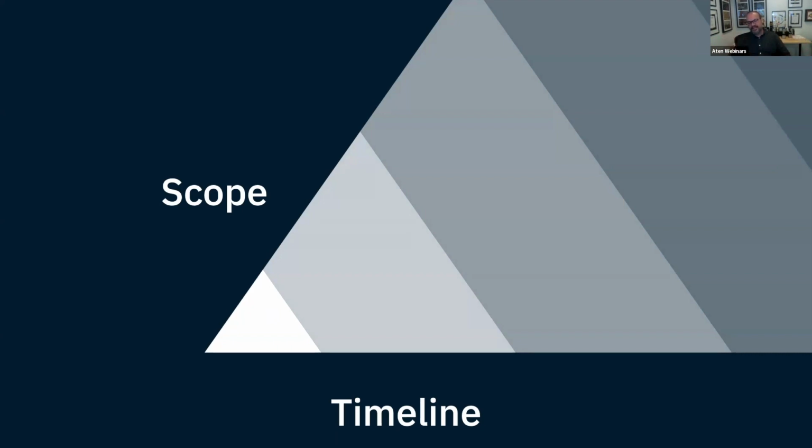And especially if you're going to RFP, I've seen this in feedback post the RFP process quite a bit, where they received like 20 proposals that were all over the map. And in large part, invariably, that is because the budget wasn't shared and every partner saw a different project. So sharing the scope, timeline, and budget in your RFP is definitely something that we recommend.